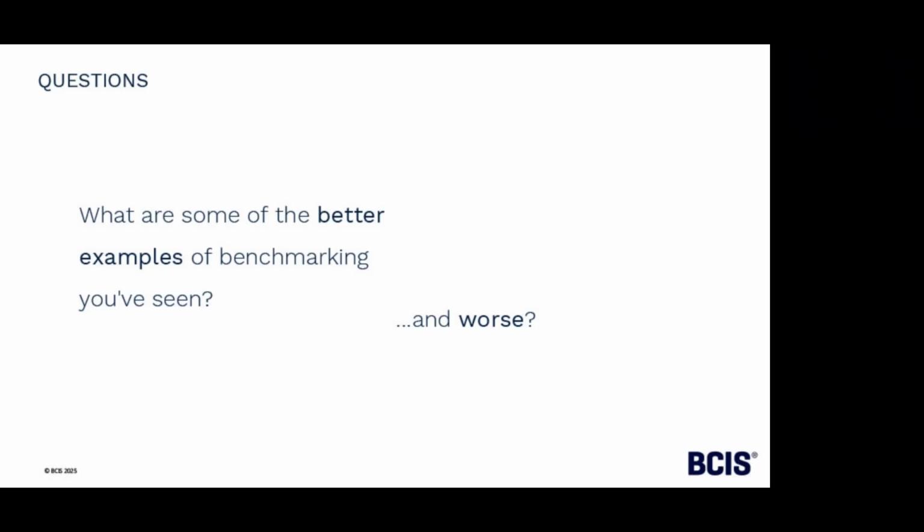We couldn't do the benchmarking study, but there were other versions of benchmarking done within that organization that we looked at, which again were based on data that wasn't comparing like for like, and therefore was incredibly dangerous to be using. So for all of those reasons and challenges, we should have got to the point of saying benchmarking is not possible. Let's set up processes and start to capture data. And the way you were talking with your good example, Carl, that's what needed to happen on this particular project.